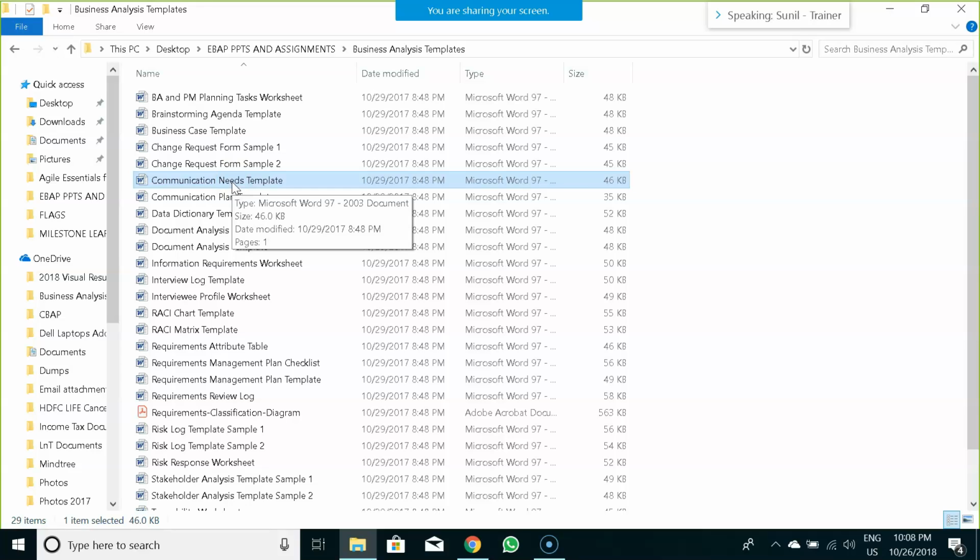Okay. So change request can also be done in both methodologies, waterfall as well as agile. So you may have an entire agile project which is operational in nature, wherein you would have change requests coming up to you. So therein you may not get the requirement in the form of user stories. Rather, you would be receiving high level requirements as change requests, and then you have to transform those requirements into user stories in an agile environment.